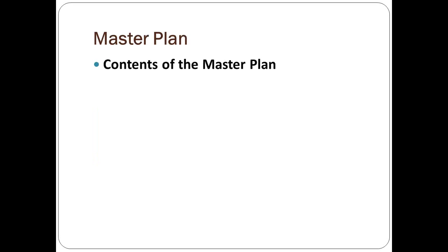The master plan, what are the contents? Well, you're going to have a site plan. A site plan, and I'll try and have one for you at our next webinar, part 4, the final session of this first phase on construction. It shows maybe on a big board where it takes the full topo and boundary survey, where you're putting phase 1, 2, 3, and 4 of the buildings, phase 1, 2, 3, and 4 of your parking, phase 1, 2, 3, and 4 of your ball fields, and on you go to the full development of it, and shows how your ministry design fits in and through these facilities.